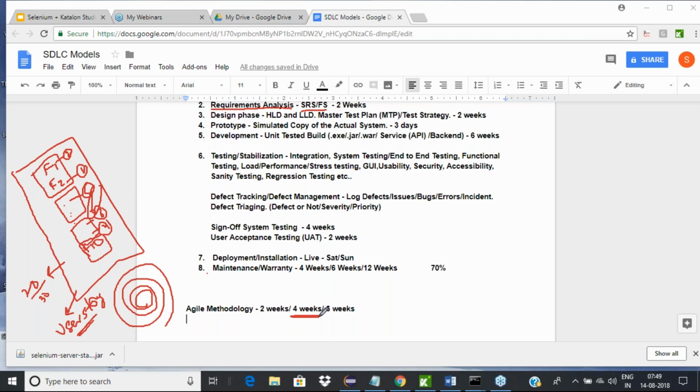In one sprint, you may do only 2 features. In another sprint, you may do only one. But because now we will give the customer the cycle, he will plan his business according to every 4 weeks or every 2 weeks. Most of the current projects are actually 2 week sprints. So that's the kind of difference from a traditional waterfall model to the agile model.